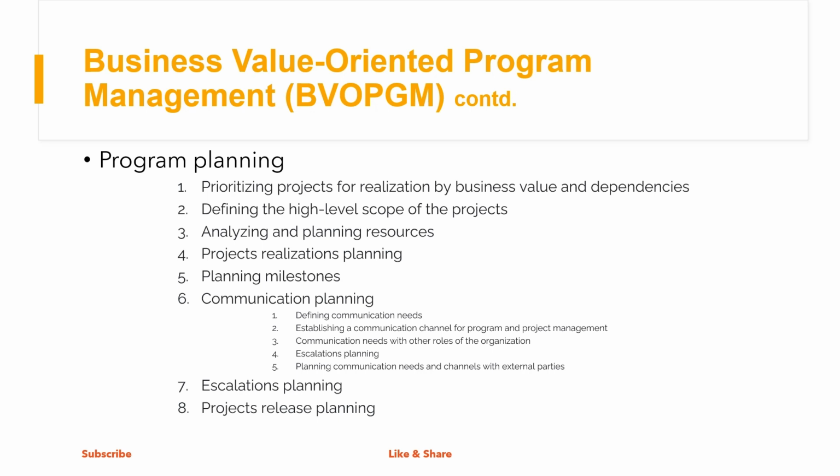The planning of project realizations, resources, budget, and milestones should take into account phases that may go beyond the predicted timeframes, such as testing, validating defects, repairing, etc., and acceptances. These considerations are valid for both programs and project management activities, and as a result, buffer time may be needed between different phases and milestones.